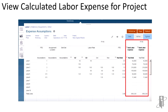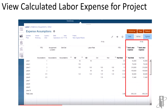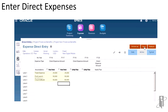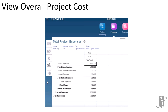I can look at my calculated expense based on my estimated global rates and the number of people I'm going to have on the project. It can multiply those assumptions together and give me some idea of what my total labor expense for that project is going to be. There are also going to be some expenses that are not labor-specific — there might be travel expense, maybe a monthly cloud software expense, or maybe I'm building out a data center. So we can track those direct dollar amount expenses as well, and then I can look at the labor plus my direct expenses.